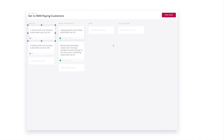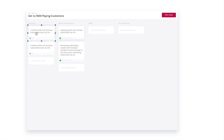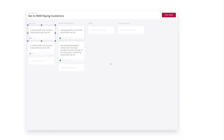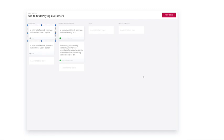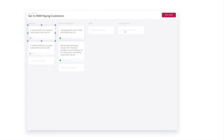What we are now trying to do is validate an assumption behind why we built something and whether that assumption was true. That requires just changing the description of the task and treating it as an experiment. Rather than saying let's build a referral offer, we simply say, here is our assumption: we believe that by building a referral offer, we will increase the number of paying users by 10%. As this experiment moves through our Kanban and gets to validation, when it's launched, we can look into did this work?